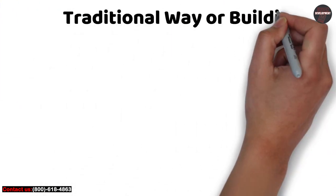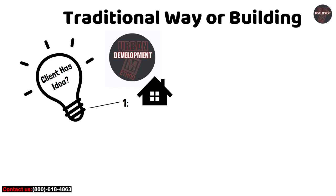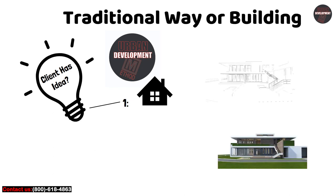In the traditional general contracting method, owners first hire an architect who designs the facility, then bid out construction work to contractors, often selecting the low bidder.